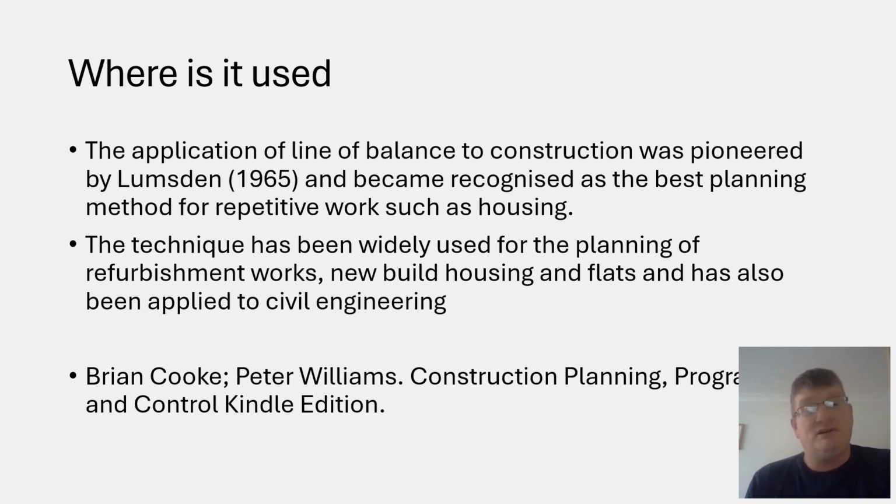It was pioneered by Lumsden in 1965, and really it's one of the best planning methods for repetitive work, housing, which you've got in this particular scenario, or even refurbishment, provided the refurbishment is a repetitive operation, or civil engineering, piling in particular, because you see use of piles, pile caps, beams, floors, etc. Just to let you know where it could be used, I've used it myself in manufacturing, repetitive operations, and it works really effectively. It's a very good problem solving tool, actually.